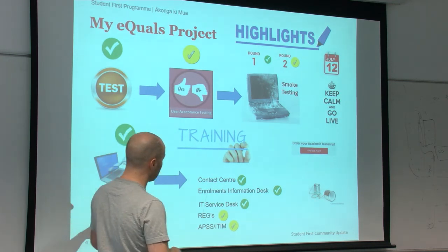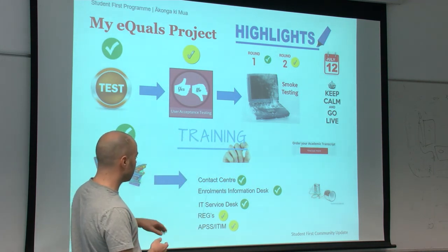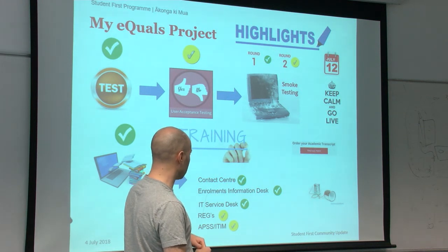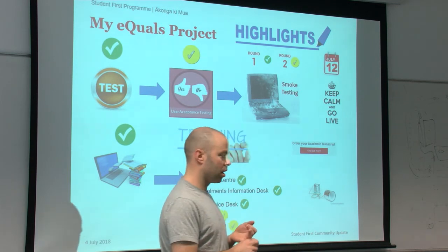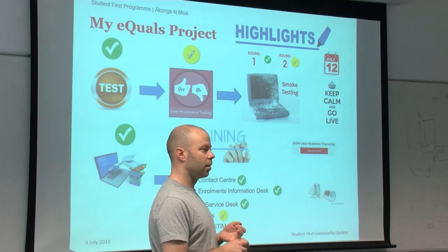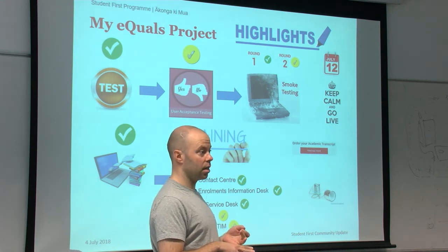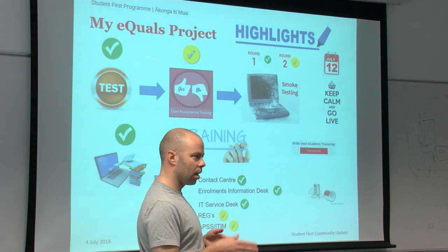So on the training side of things, we've had contact centre training, enrolment information desk, which I think was combined, and the IT service desk training. We're going to run through the final week's training tomorrow, I believe, and the program is going to provide support for a month after go live. We've had meetings with ITS, but we'll work a bit closer with them in terms of the handover and all that.